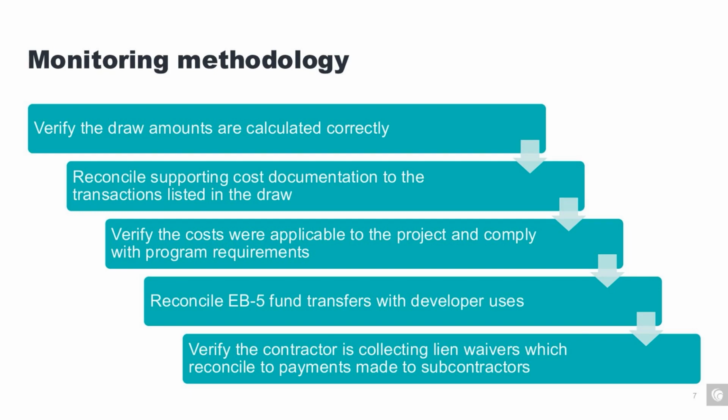Now that we know that what's been presented to us has an accurate face on its computations, it becomes imperative that you look down into the details. What are the source documents and how are these invoices being comprised? We expect that the draw package should include invoices from all the contractors and consultants expecting to get paid this month. Additionally, these invoices should be backed up with the appropriate source documents. They should have timesheets. They should have supplier invoices, subcontractor pay applications, perhaps purchase orders.